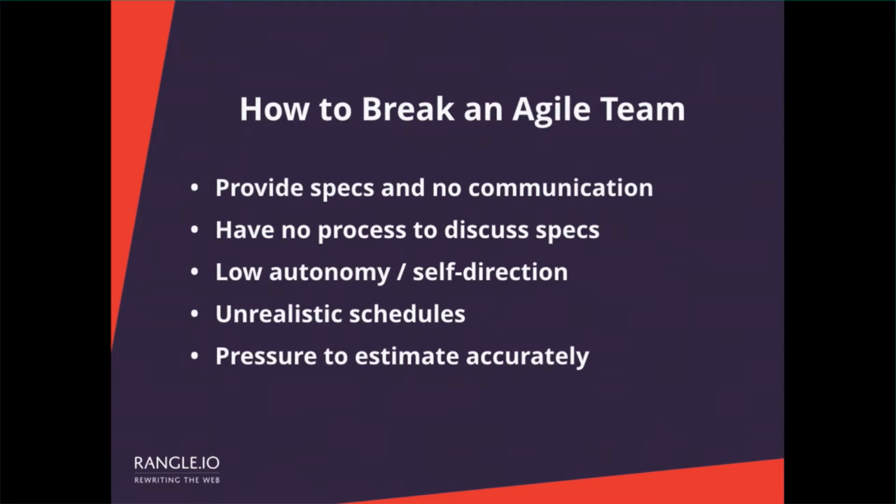Now, we're very clear we're an Agile company. We do time and materials. There's risk in software. But again, people sort of have an expectation that you're going to be close. And we don't know everything about a system. And sometimes the APIs are broken. There's like massive issues in the original design. These are things that come up in that learning, which should be a good thing, but that causes the schedule to slip, and that causes sort of schedule pressure.